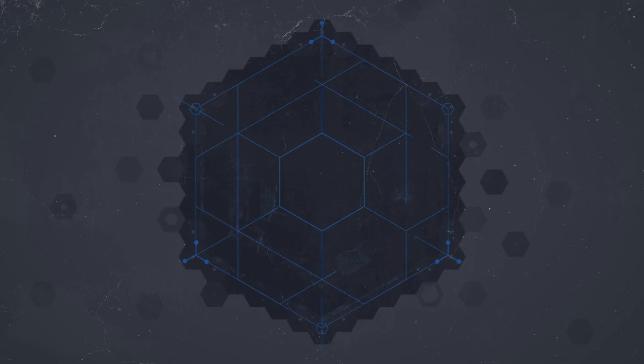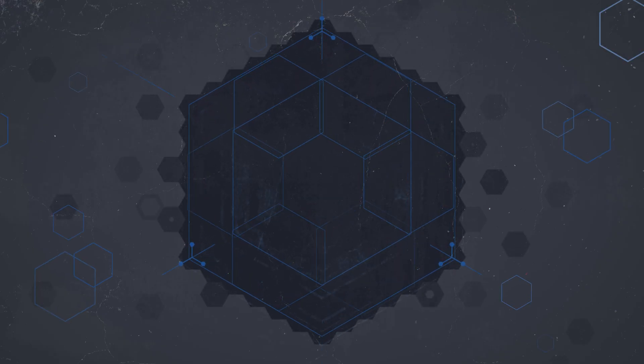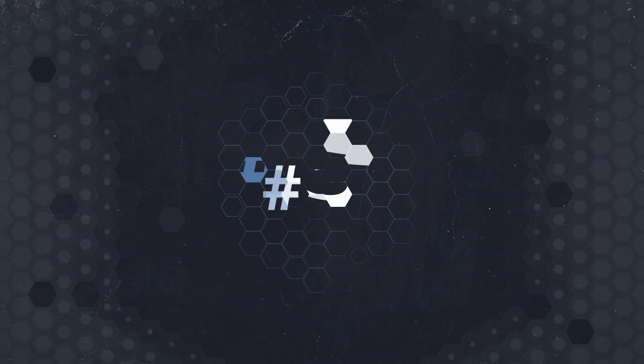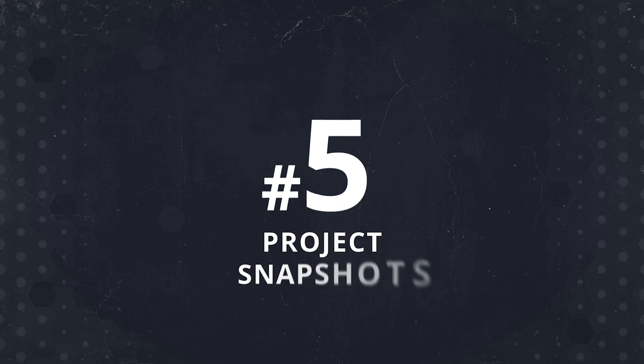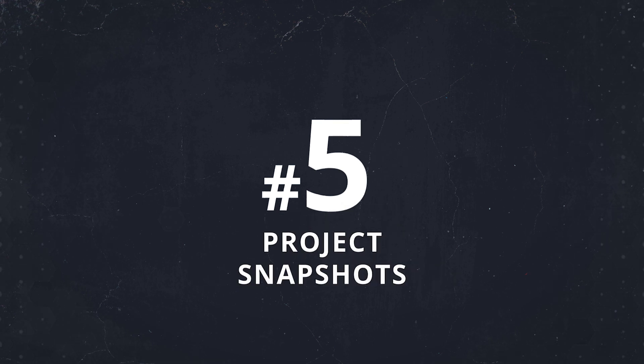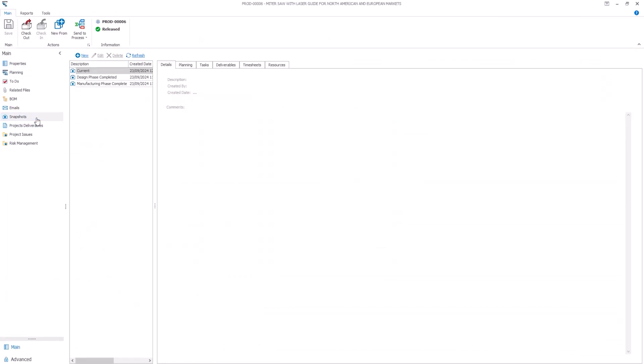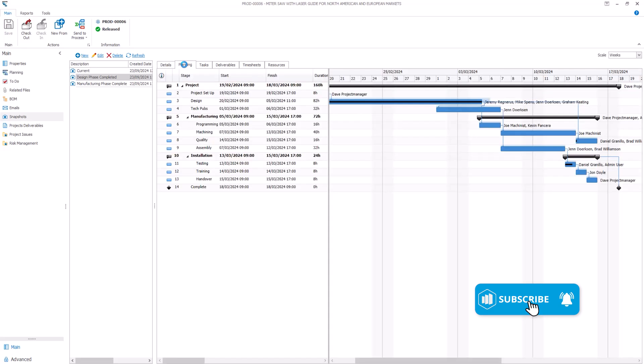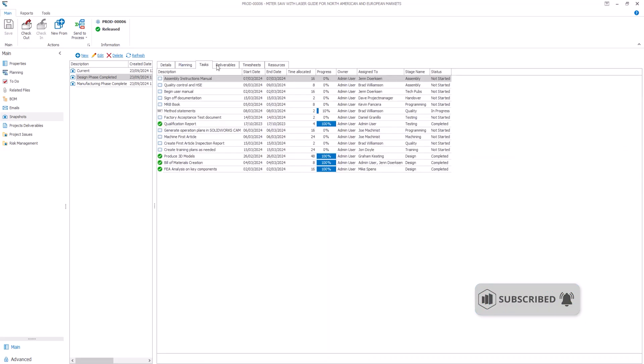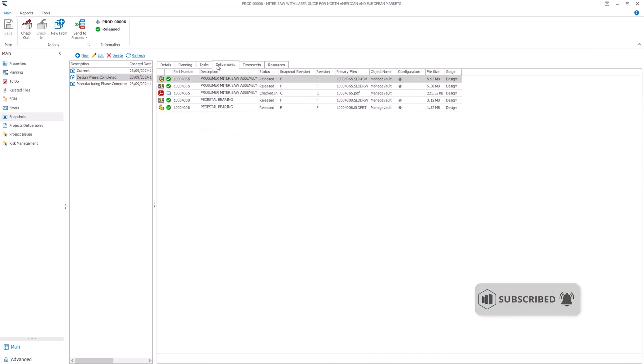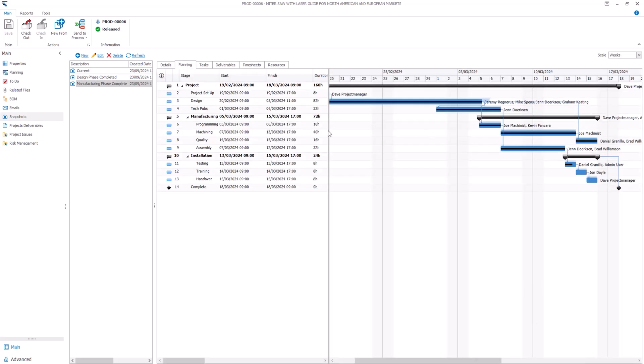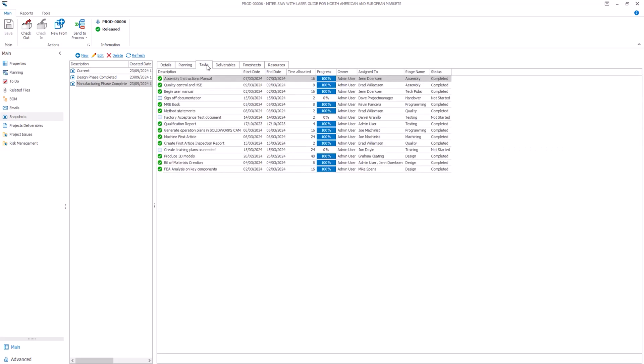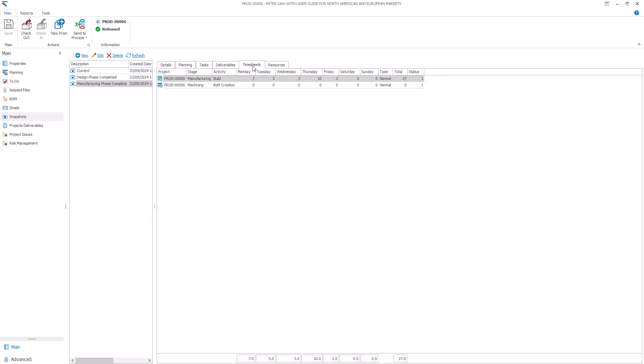We're into the top five now and project snapshots come into the latest release of SOLIDWORKS MANAGE. This new feature lets you capture key project information at any time, including Gantt charts, tasks and timesheets. It's like taking a picture of your project's progress, giving you quick access to historical data without needing to generate a full report.